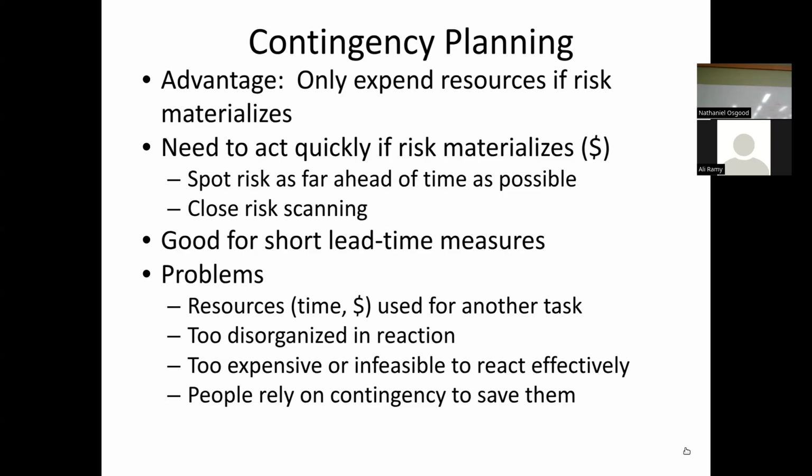I knew a guy at MIT who was in charge of a $6 billion launch of an oil rig in Norway. And he did effective contingency planning. When it was launched, they had a set of helicopters ready to fly out just in case a problem developed. And lo and behold, that's what happened. The helicopters dropped scuba divers in, they welded shut a leak that had developed, and it saved the oil rig from sinking. $6 billion of investment saved because he paid a couple hundred thousand just to have the helicopters that responded in that case.